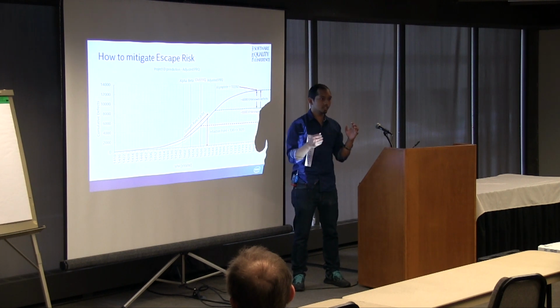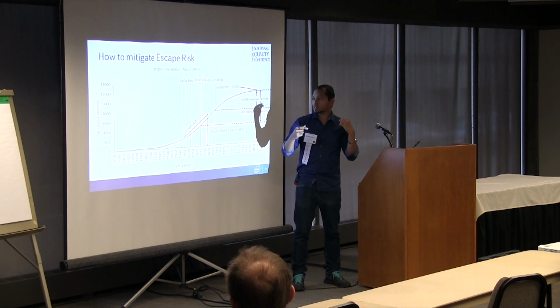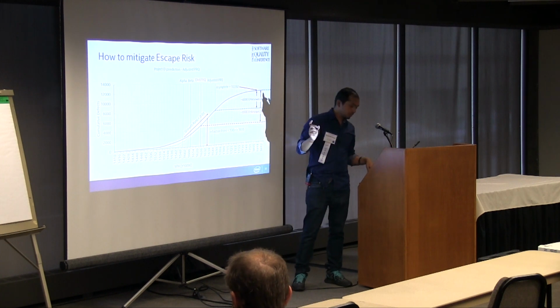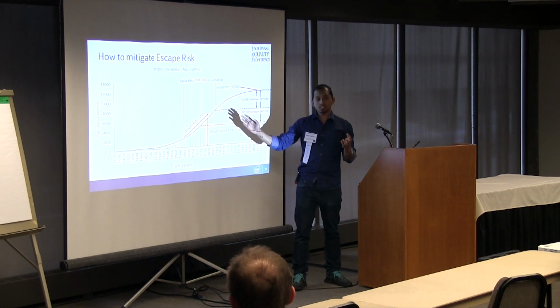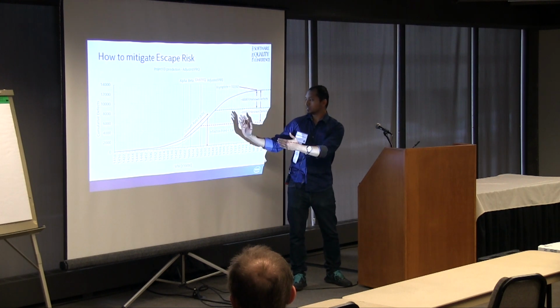Instead of doing that, you have to plan all the validation activities much earlier, so that you don't come into this stage. In this case, this was our only option where we had to move the milestone.